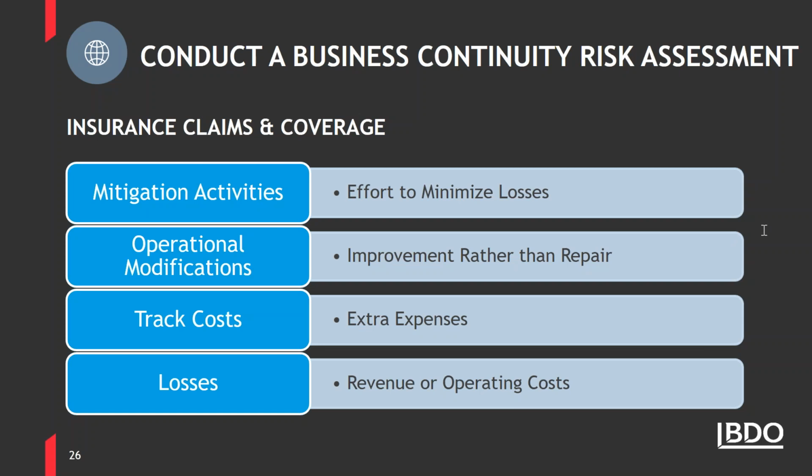All incremental and abnormal costs should be tracked, including but not limited to the following: cleaning and premise disinfecting costs, crisis management, communication costs to inform the public or employees, overtime pay to make up for the production losses. The incremental cost should be easily identifiable and tracked. We recommend setting up a separate general ledger account within your accounting records for recording such costs as a best practice. A key takeaway is that even if certain costs may ultimately not be covered under your current insurance programs, they can inform future risk mitigation and management strategies and may be recoverable through government support as well.